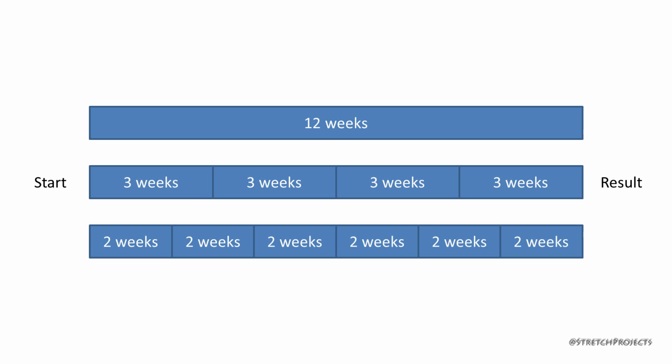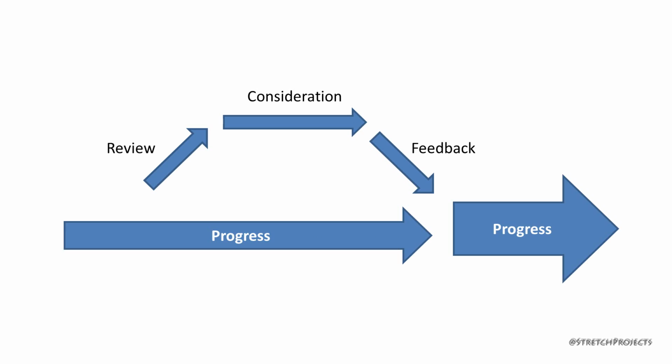The idea is, at the end of each sprint, progress will have been made from the last sprint, and that progress will be all working and in a state that we could potentially hand over to a user to actually go through and use. This allows Agile to come into its own, especially by asking the product owners for feedback at the end of each sprint during what's called a sprint review meeting. Any feedback provided can then be taken into account for the remainder of the project, and if changes are necessary, we have plenty of time to actually make the changes, rather than rolling out the entire project and deciding that we want to change something at the end.